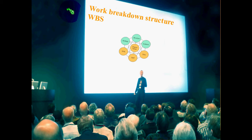Welcome back to the next module of the PM Distilled PMP preparatory program. Let's take a quick recap of where we are. We started with project initiation — the inputs were the contract, the statement of work, the enterprise environmental factors, and the organizational process assets. Initiation was performed by the project sponsor, and the first thing done was developing a project charter, which contained the business case, constraints, assumptions, key stakeholders' names and contact details, and high-level milestones.